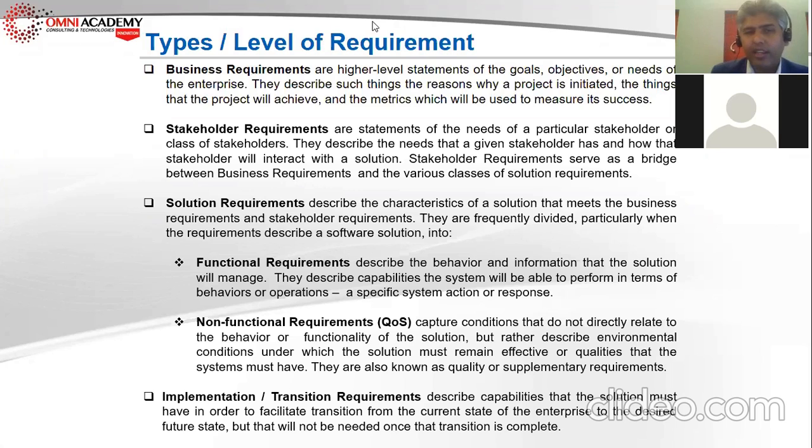So the more important thing in non-functional requirements is to identify those non-functional requirements that are crucial to the success of functional requirements. For example, if there is a requirement to run a report or generate that output within 30 seconds, and the project timeline crunches, the first thing the project manager will do, and I'm sure you are most aware of this, is delete the non-functional requirement from the release.